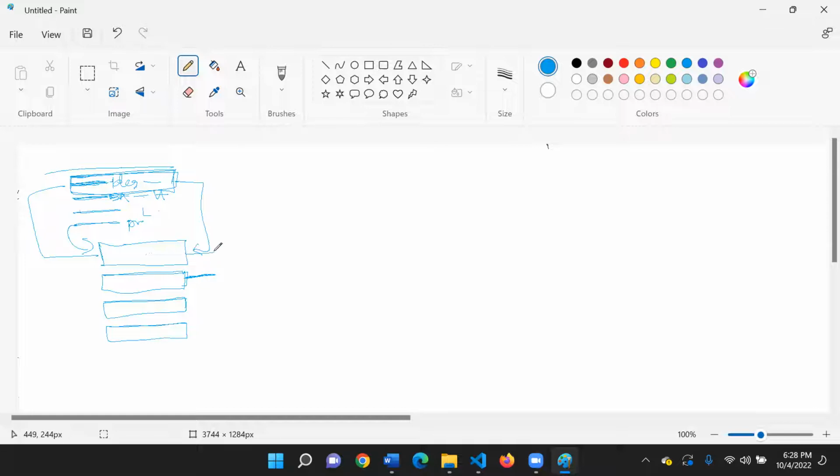It was rigid. So in this process of developing software, following this step, and then once that step is complete, we move to the next step. Once that step is complete, we move to the next step. And then once you are at this step and there is a change here, if this guy now decides, no, that was not the idea, it means that you have to go all the way and start all over again. In other words, all of your previous efforts will be wasted.